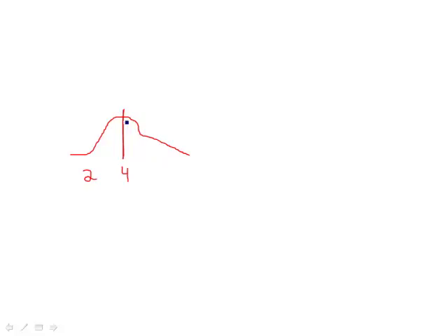Well, because this distribution starts to flatten out here, because we recognize that the activity could really go on quite a long time, I've got to get pretty far out to get to a point where I can cover 85% of the observations. I've got to get probably way out here to get something that I'm confident that I can hit, and that looks to me like probably at least 7, maybe 8 days. So I'm really building in quite a bit of extra padding here.